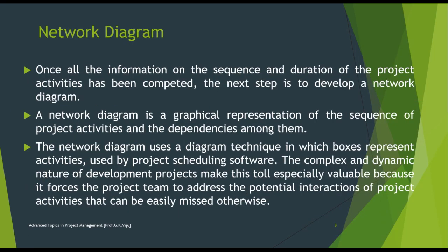Then comes the network diagrams or precedence diagram. The precedence diagram is a tool for scheduling activities in a project plan. It's a method of constructing a project schedule network diagram that uses boxes referred to as nodes to represent activities and connect them with arrows that show the dependencies.